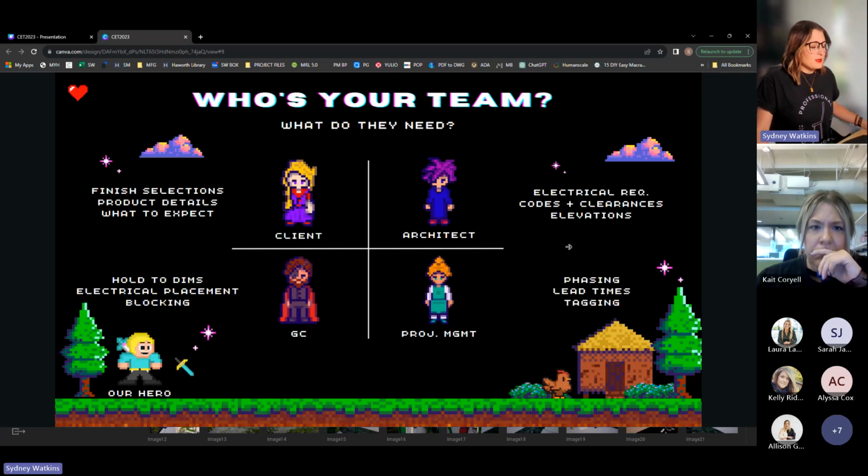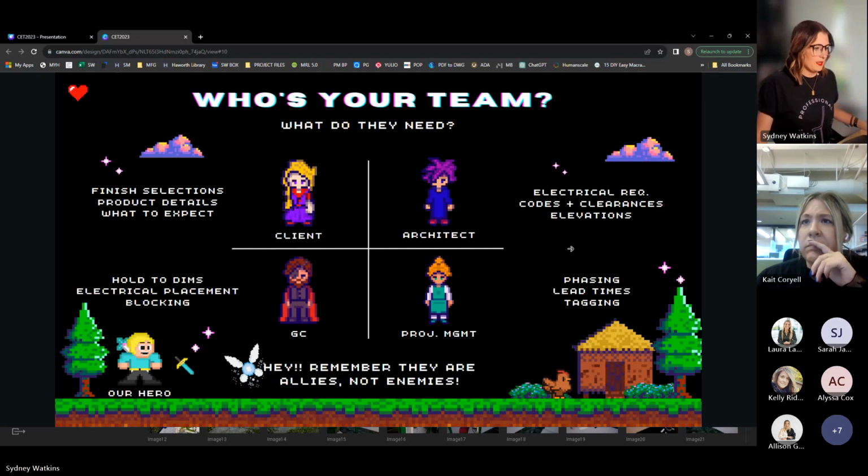And last, but maybe most important, in my opinion, is our project manager. They're the ones that are going to execute all of the hard work that we've done on the upfront. And if we don't properly communicate with them, then it doesn't really matter how good of a job we did at the beginning if when it's installed, it doesn't look good or it's not done right. They rely on us for all of that. So they need to know phasing, lead times, and tagging so that everything arrives to site. We're not paying for extra trips, things like that.